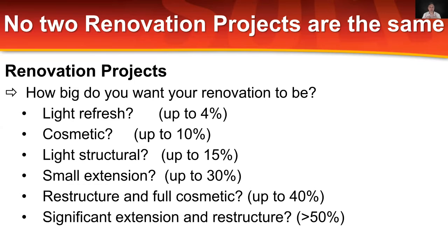Now, if you're going to do a cosmetic renovation, your budget is generally up to 10% of the value of the property. And for every dollar you spend, you're looking to get about $3 lift in value as an approximation.